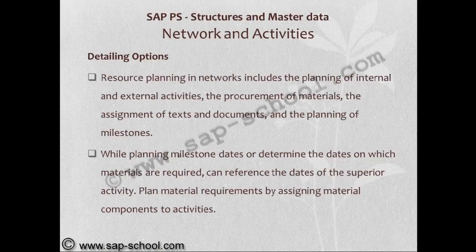Resource planning in networks includes the planning of internal and external activities, the procurement of materials, the assignment of text and documents, and the planning of milestones. While planning milestone dates or determining the dates on which materials are required, we can reference the dates of the superior activity.